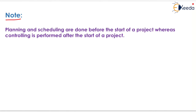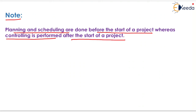One important note: planning and scheduling are done before the start of a project, whereas controlling is performed after the start of the project. Before starting the project, we plan and schedule all activities so it completes within a particular time interval. After the project starts, if any activity is behind schedule, we control that activity to finish it quickly so the project is completed within the minimum time period.